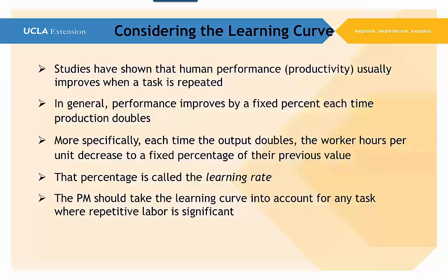What is really interesting about it is that every time the output doubles, there's a predictable reduction or decrease in the worker's hours required, and that's a fixed percentage.